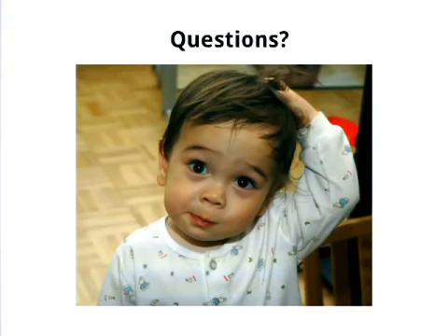Sweet. Oh, sure. I don't know if it's totally related to your talk, but I'm wondering how you manage budget with Agile. How we manage budget? Or budget and scope. Well, it depends on the client, to be honest. Some clients don't like the burn down aspect, but I think it's all about, if they've agreed to it, then they understand that they're burning down against a budget, and it gives them the flexibility of not worrying about scope creep and not forcing them to fill in change requests.